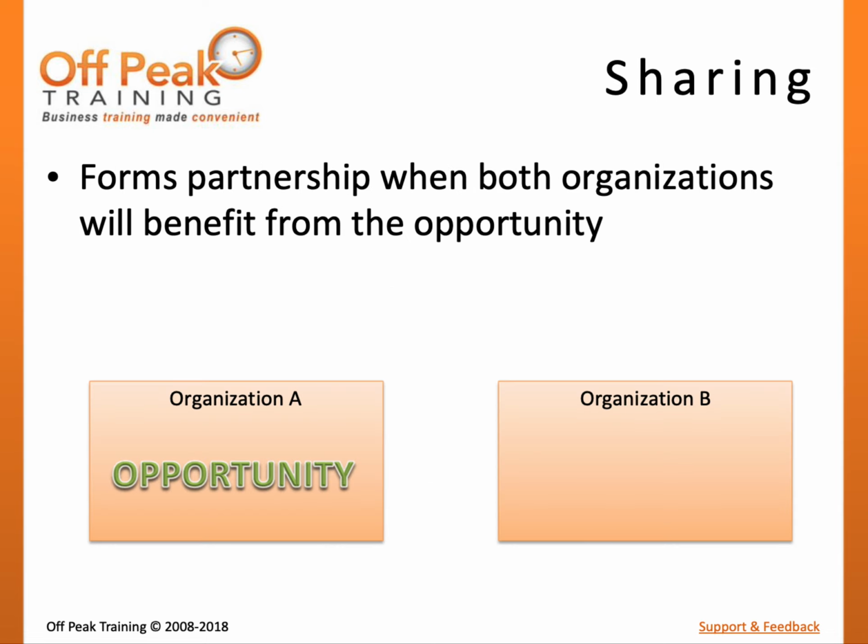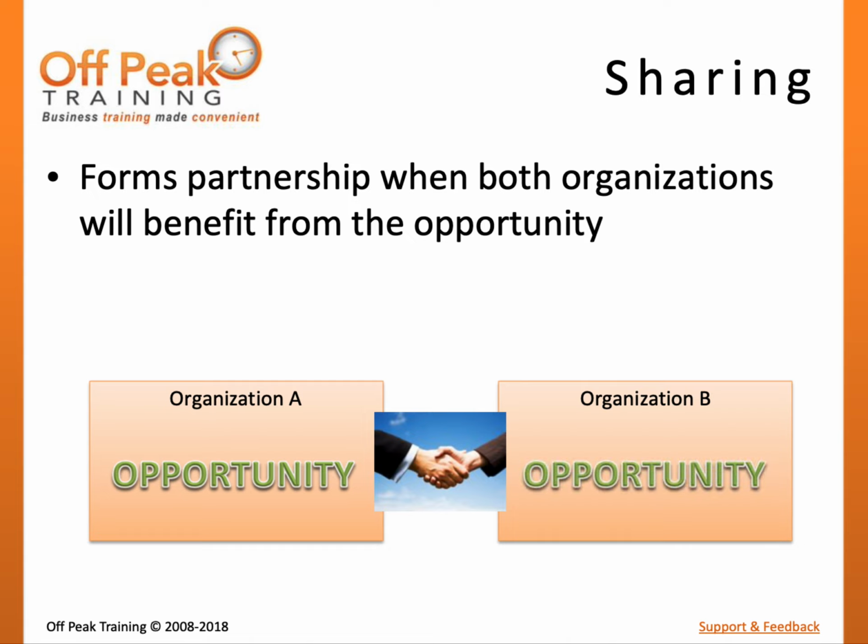If the project team is not prepared to directly manage the opportunity, they may be able to share in the opportunity with another organization that will also benefit and may be able to aid in the response. Sharing is essentially the opposite of transferring. For example, in the case of the zoning law, we may be able to team with other construction companies that would also benefit from the legislation and may be able to help us increase the probability or the impact.